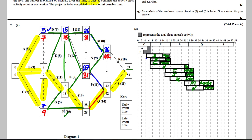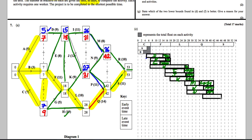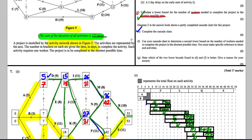For P: it starts at 27 and is 11 long going up to 38, but could go up to 42. Draw it out to 42. S is already done, so we just need R. R starts at 36 and is 10 long going up to 46, but could in theory go all the way up to 53. Draw it out to 53. That completes the cascade chart.